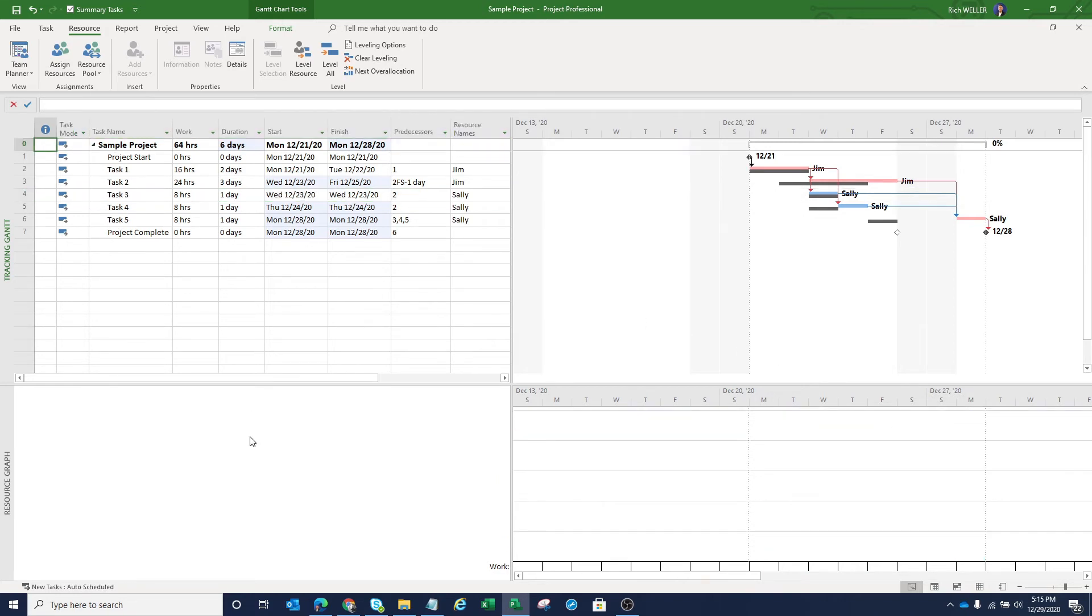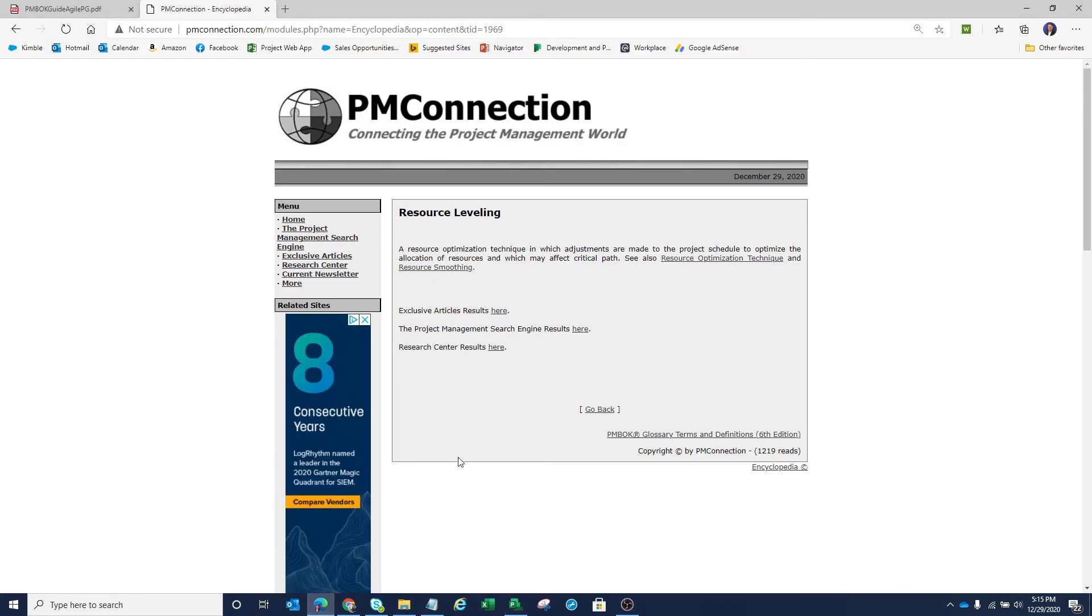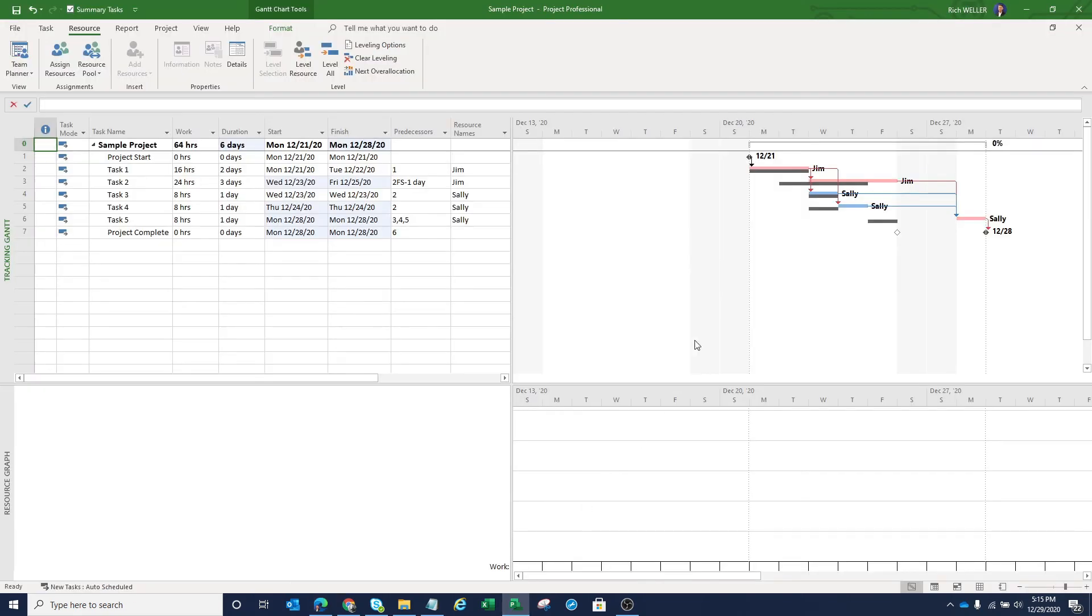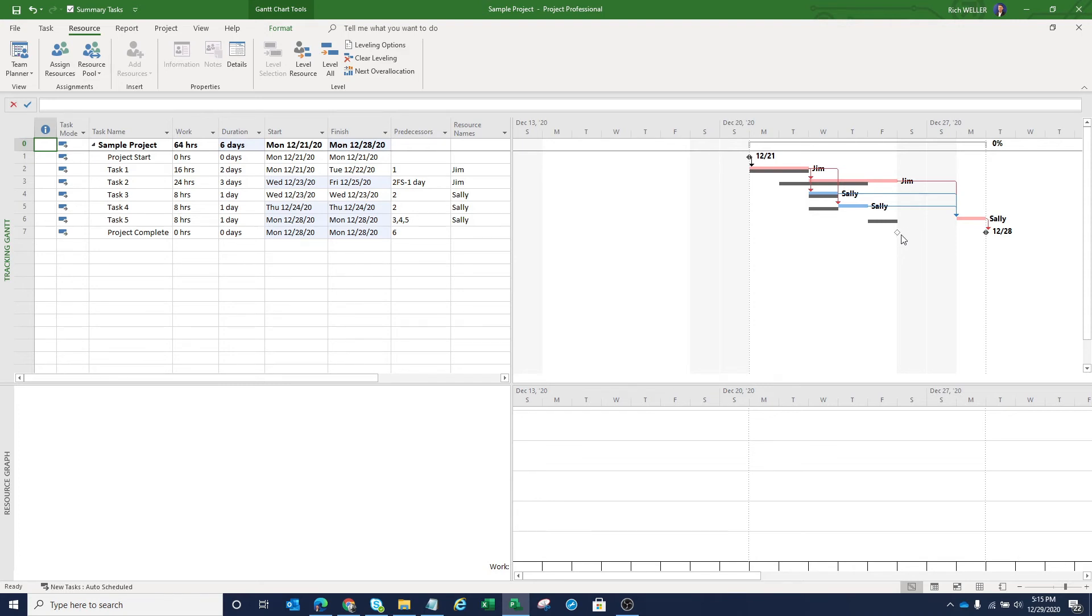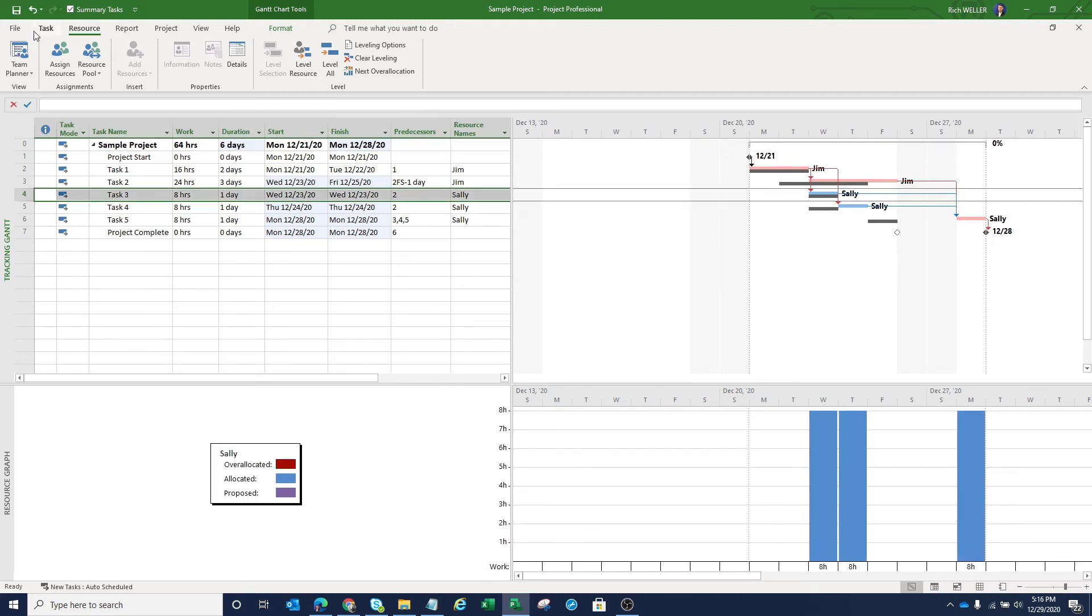But if we go back to that definition from PMBOK, you'll remember that it says it may affect your critical path. If we look at the tasks or the activities that are currently on the critical path, for sure, you can see that a number of those tasks pushed out. From here, we can see that this project schedule was targeted to complete on this Friday. And by leveling this project, it is now targeted to complete on Monday, the 28th.